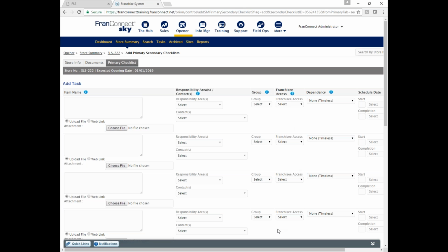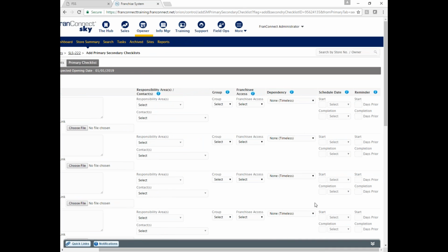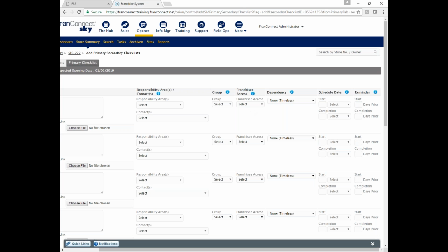Here's my task. And what I really need to know about the task isn't the date of the task, although I can do that. If I know this thing has to happen April 15th, I can totally do that. I can just say calendar and put the date in. But as you point out, if we don't know the date, all we care about is that it happens a day after the previous thing lets off. We don't actually ask for a date.